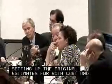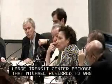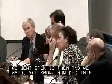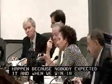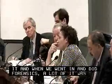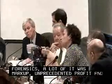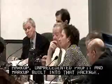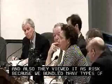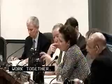And the large transit center package that Michael referred to was unprecedented in result. And so we went back to them and we said, how did this happen? Because nobody expected it. And when we went in and did forensics with the contracting team, a lot of it was markup. A lot of it was just unprecedented profit and markup built into that package, and also because they viewed it as risk because we had bundled many different types of work together. Right. So that was where they also participate in the development of the strategy to break it up and give us a sense of who's available in the market and ultimately manage those individual contracts.